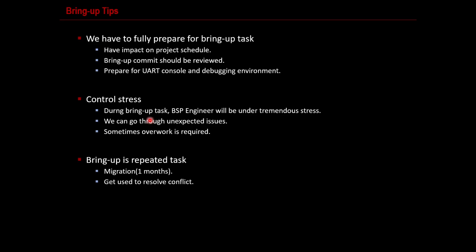Sometimes they give you a lot of stress because a delay of the bring up task will have an impact on the project schedule. The reason is that other software engineers, such as middleware software engineers or application engineers, cannot even start their work because they do not have a sample or target device which is working properly. As for me, I overworked for more than 1 day until the bring up task was completed successfully.